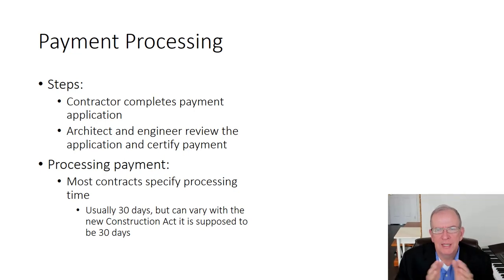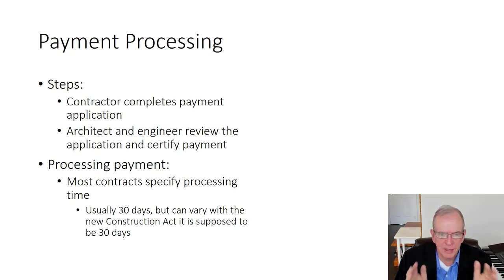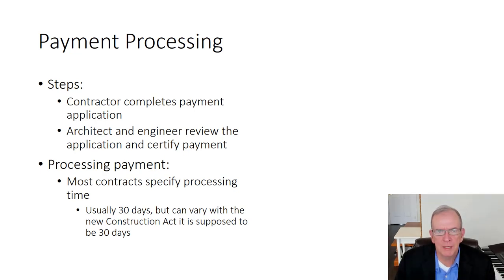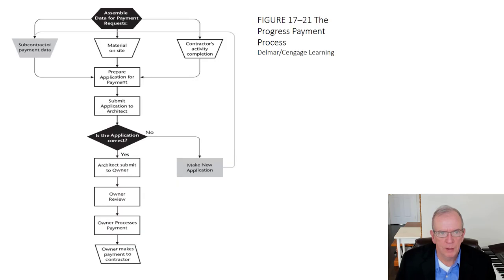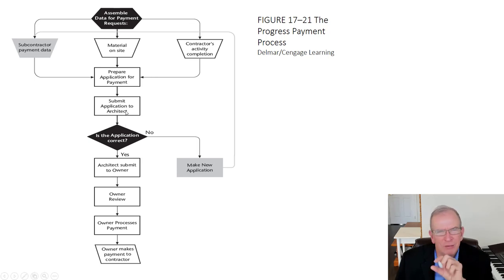The Ontario Construction Act came about because payment timelines were stretching — when I was running a construction business it was around 30 days, then it became 45 days, then 60 days, and some European contractors were pushing even longer. The government put a clamp on it because extended payment periods can make construction companies go bankrupt. The goal is to make it more regimented so people aren't taking advantage of others. The process flow is: assemble data, confirm activity completion, prepare the progress payment application, and submit it to the consultant.